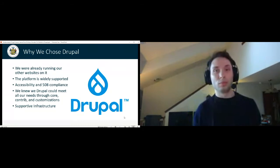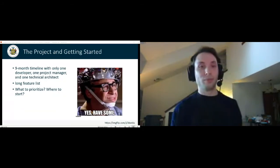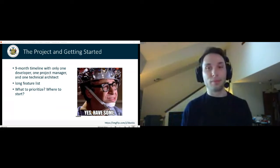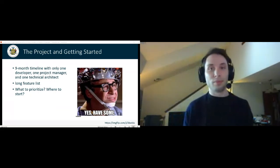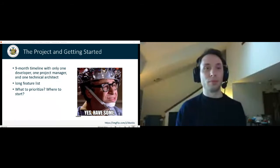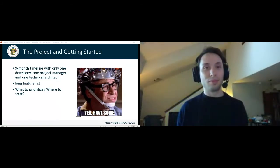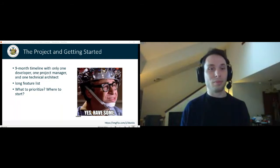Now here's the fun part. A project like this is large and needs a lot of time and resources. We had neither. We had a tight timeline of 9 months, and our team consisted of 1 developer, which is Steven, 1 project manager, and a technical architect, which I played that role.